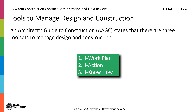An Architect's Guide to Construction by Brian Palmquist states there are three tool sets to manage design and construction. First, I-Work Plan — a traditional work plan, also called work breakdown structure, is simply a list of all of the key processes and procedures involved in design and construction. Second, I-Action describes the integrated set of transient communications that capture I-Work Plan work products and deals with emergent issues. Third, I-Know-How encompasses the experience, expertise, and knowledge database that each designer and builder need to assemble in order to evolve, become efficient, and more competitive.